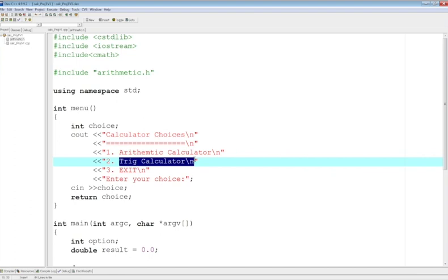Okay? So you go back to your requirements and you read them carefully in terms of what does the user want. They want to be able to do sine and cosine. Good. They're not asking for tangents or cotangents. That's the scope of the work. So the scope of the work, what they want, and make sure that you specify exactly what they want and you are clear as to what they do not want. That way you don't end up with what we call scope creep.